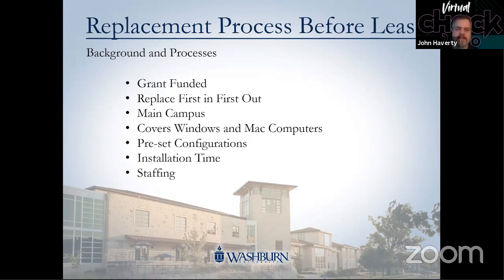Our computer replacements, as I mentioned, have been grant funded, probably for the last 10 to 15 years, completely grant funded, which means one year we'd get some money for it, maybe $150,000, and I'd do a batch of computers. The next year we might get 200,000, back and forth like that every year. So we didn't know exactly how much we were going to get from year to year, which means we quickly, as you can imagine, got out of sync of trying to target that 5-year replacement cycle.